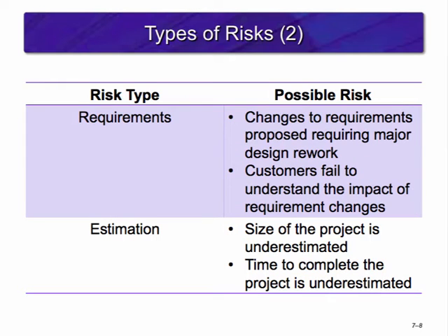The requirements themselves are a risk to be considered. If a requirement needs to be changed, it could require a major design rework. Adding to that, the customer may fail to understand the impact of the requirement change. Thus, you now have to address the scope creep.